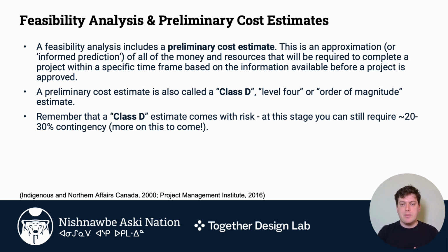But the important thing to remember about that is that the total project, for it to be able to move forward, and we're talking about feasibility, and especially when we're talking about the scope of the project, what we just talked about in Module 1.1, is making sure that if the budget or the number that we're getting at this point, if 30% is added to that, that's still possible for you. So it's important to keep in mind throughout this discussion of preliminary budgeting that we should always be accounting for 30% on top.